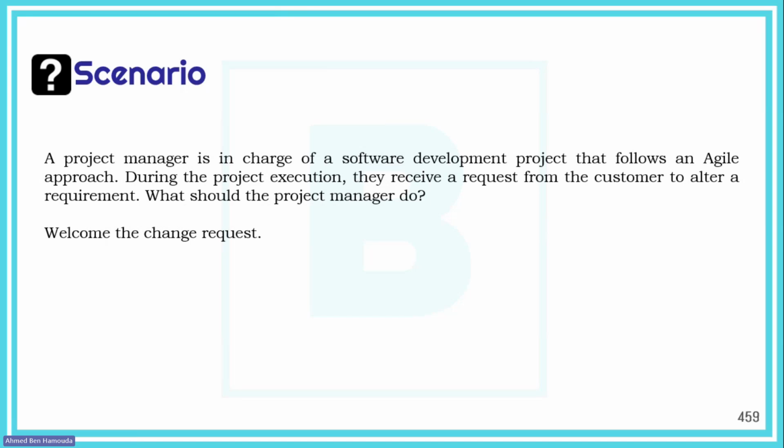And then you might be saying, okay, that means 4 sprints inside one sprint. No, because we will have only one review meeting and one retrospective meeting at the end. So that's not 4 sprints. That's just one sprint, but with 4 planning meetings.